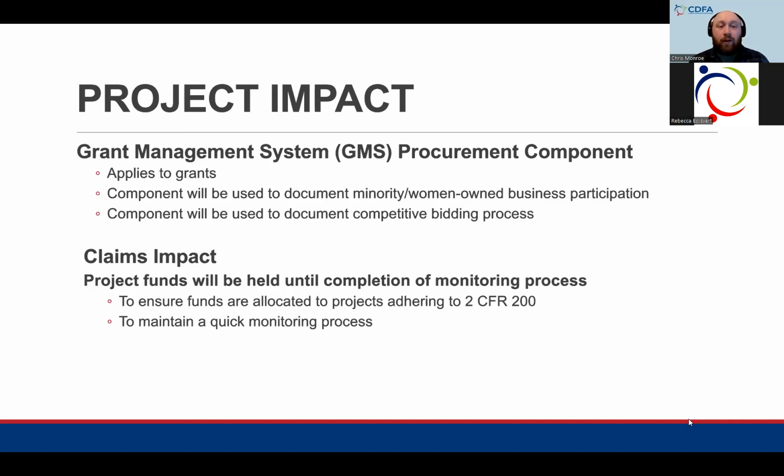And related to the claims impact, project funds currently will be held until the completion of the monitoring process. This is to ensure that funds are allocated to projects adhering to 2 CFR 200 and to maintain a quick monitoring process. So again, that's just the security mechanism that is authorized by Gopher, is authorized by 2 CFR 200, and we just have to ensure that we're slowing down the funds disbursements, at least for the next few weeks, to make sure that we can go through this process, and again, to make sure that funds are being put into projects that are compliant with the federal requirements.